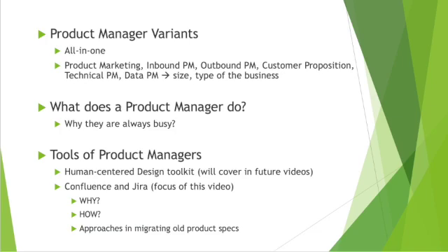But it also depends on the team. When the team is set up, there should be an agreement on how detailed a user story should be. In my case, because our developers are not very experienced, our user stories are very detailed about every step they need to take to build the feature. Sometimes it even includes pseudocode. But if your developers are very experienced and could also be the domain expert, then I think the user stories don't need to be very detailed.